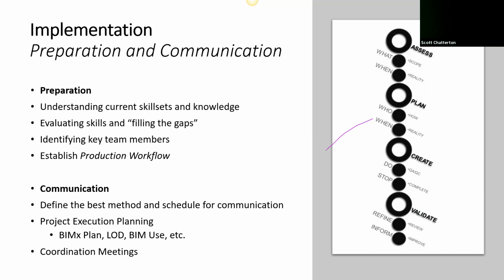Communication includes the BIM execution plan, identifying the LOD, the BIM uses, etc., and then setting up and holding regular coordination meetings.